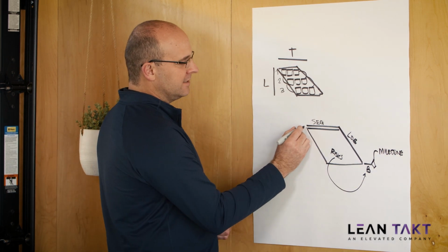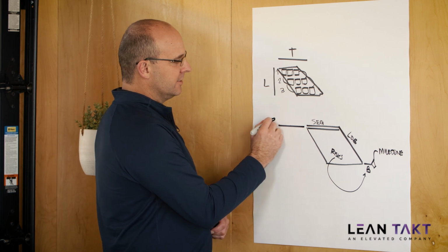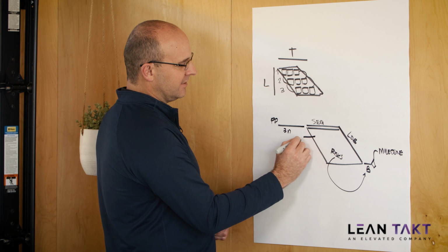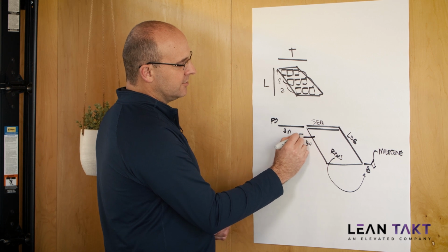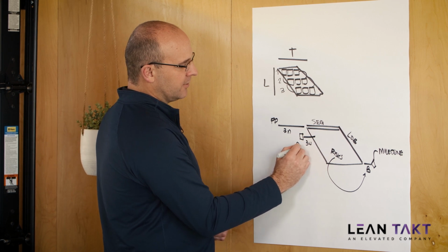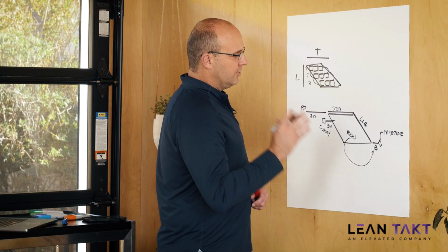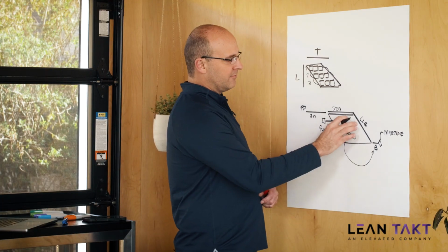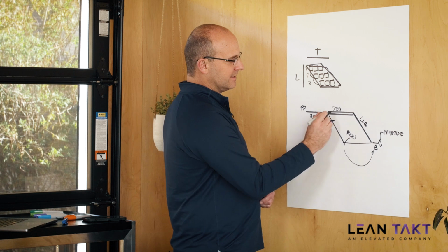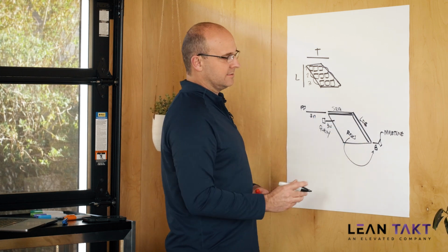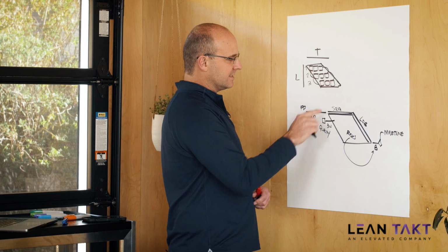And for every phase, it's best practice for me to pull plan about 3 months ahead of time, and before any activity about 3 weeks to do what's called a quality pre-install meeting, okay? So this is the overall structure. You will never, ever, ever have a phase with a train that doesn't need a proper sequence and a line of balance, meaning a speed of that stagger.